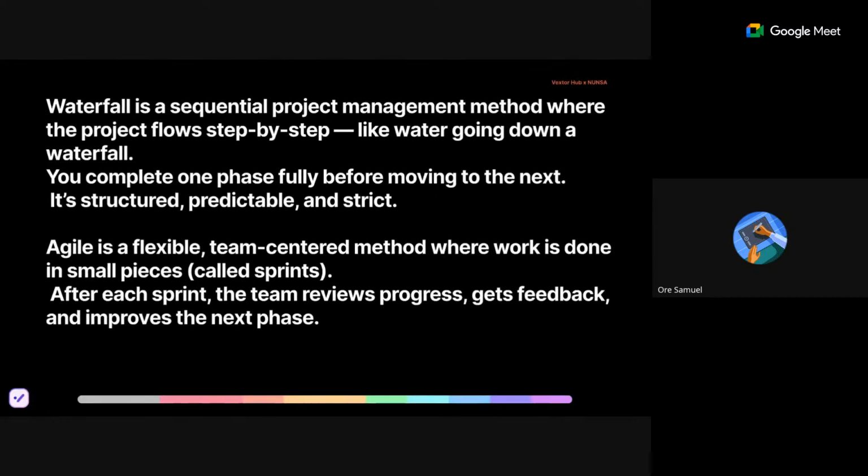It is a more strict method, because you must get everything right at the beginning. You must make sure your instructions are clear, because changing anything after that would be very difficult and would obviously cost more money. For example, in this house, it is possible to change the position of the kitchen, but that will cost more money. You probably have to break down some walls and waste some materials. So it wastes time and it wastes money.